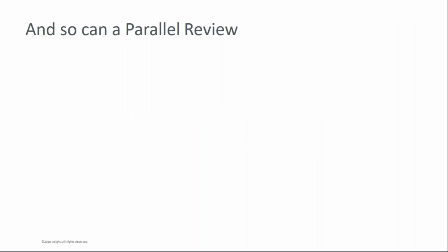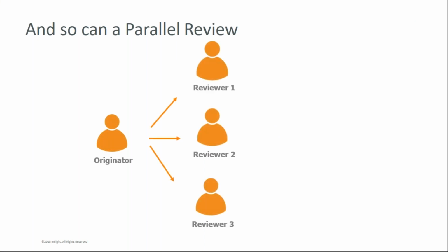Within this review team, we have a little bit of extra flexibility where we can actually set up what we would call a parallel review, where all our reviewers obtain access to the document at the same time and offer some input before returning it to the review coordinator, who again gets to undertake that release or rejection step.